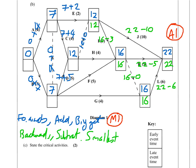I continue in a similar vein. You may now want to pause the video and complete this yourself. I'm going to do so. Next, I can obviously go into this box. It's twelve minus zero is twelve. Or sixteen minus four is also twelve. So the answer must be twelve. Twelve minus two is ten. Twelve minus four is eight. Going backwards, I choose the smallest number, which is eight. Twelve minus five is seven. Sixteen minus five is eleven. Sixteen minus four is twelve. The smallest number I just said was twelve minus five, which is seven. And finally, seven take away seven is zero. Or eight take away four is four. I obviously need to end with the smallest number, which is zero.